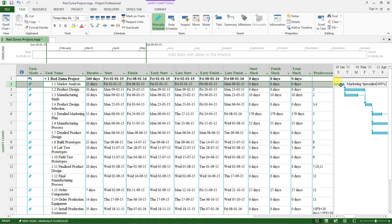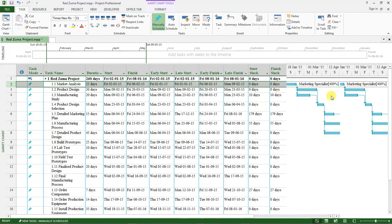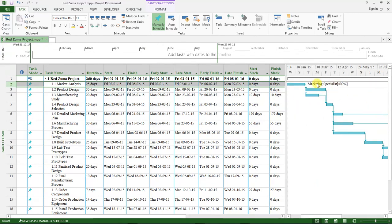You will notice that it now shows Marketing Specialist at 400%, meaning we have allocated four marketing specialists to undertake the task of Market Analysis.